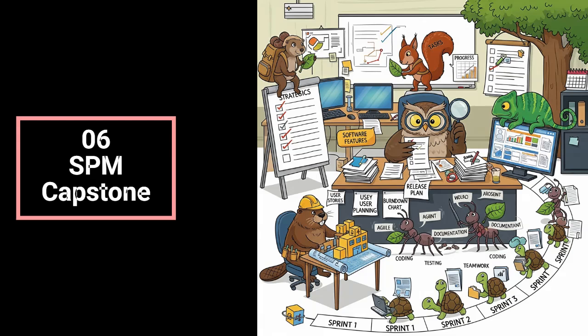Okay, story points and dependencies. The guide points back to agile planning again for those lessons. Right. So story points, it's like the team saying, this feels like a medium effort story compared to that small one, not this will take 12 hours. Exactly that. It's more about relative complexity and effort, especially early on. Avoids getting stuck on precise time guesses that are often wrong anyway. Gotcha. And dependencies, like you said, can't build the roof before the walls.